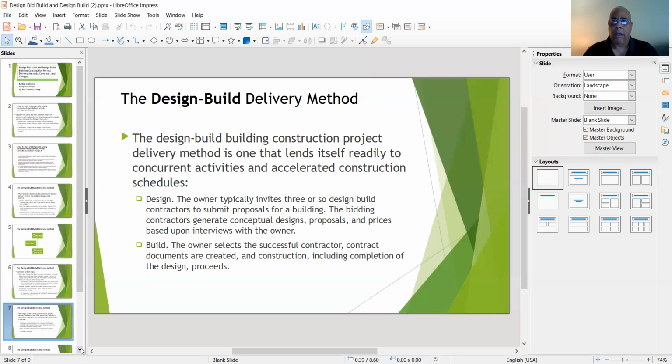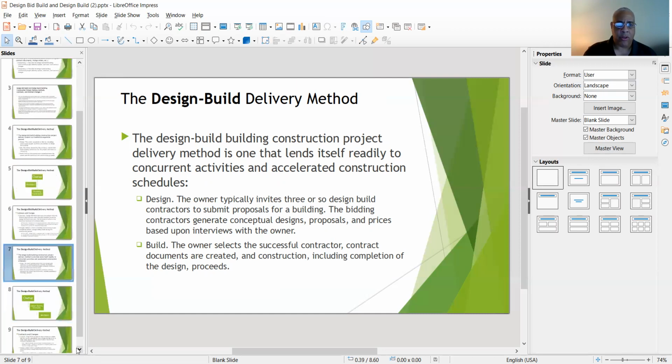Why is that? Because change orders, for the most part, will raise the original contract price. Now, I know in FHWA projects and DOT projects, there are a number of change orders, and there's a workflow that's involved for approval of change orders.